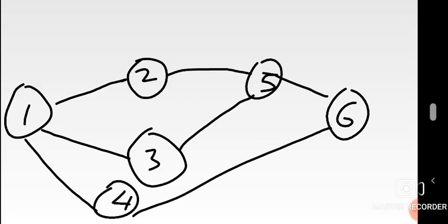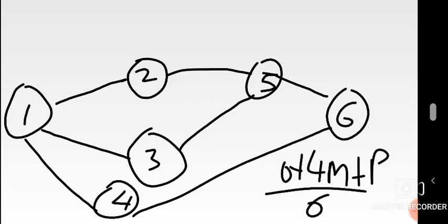Now these lines should have certain values on them, like the way we had from A to B it's a 3. In PERT, before you put those values on the lines, you get what they call the mean duration. How do you get the mean duration? Most of the time we use the formula I stated earlier, which is the optimistic time plus 4m plus p, over 6. This formula works for each and every activity to get the time periods that sit on the arcs, the lines connecting two nodes.